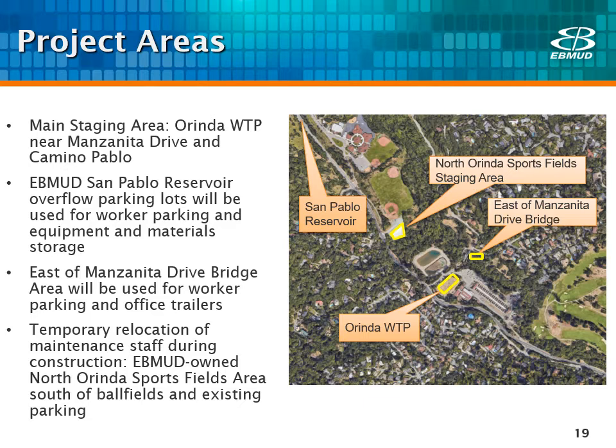The main staging area for construction will be within the Orinda water treatment plant, near Manzanita Drive and Camino Pablo. The East Bay Mud San Pablo Reservoir overflow parking lots will be used for worker parking and equipment and material storage. The area east of the Manzanita Drive Bridge will be used for worker parking and office trailers. Also, East Bay Mud maintenance staff will be temporarily relocated to the area south of the East Bay Mud-owned North Orinda sports fields and existing parking during construction. Fencing has been installed around this area to secure the area for East Bay Mud use.